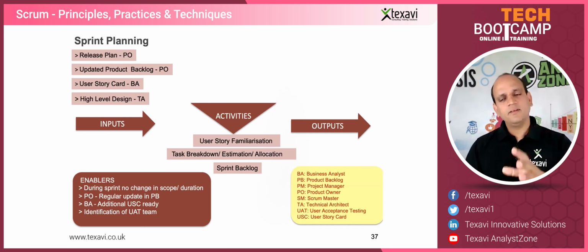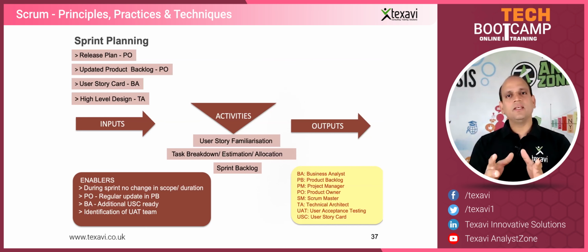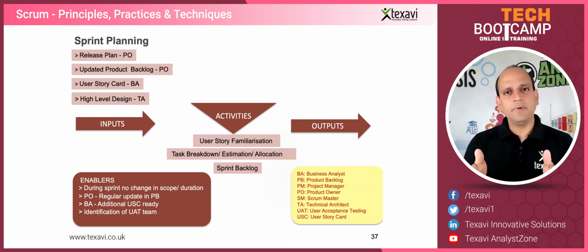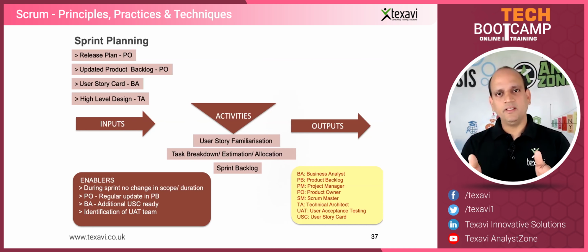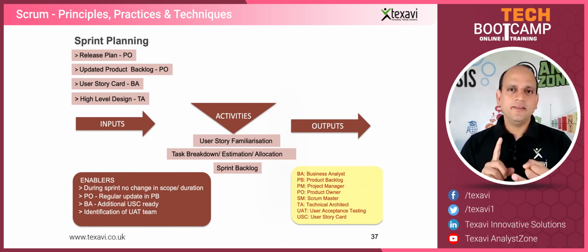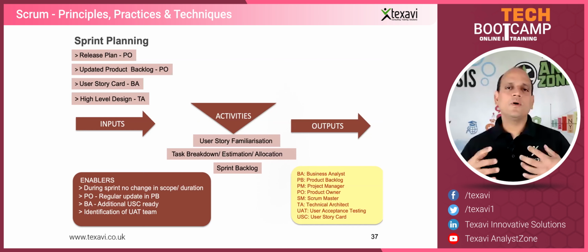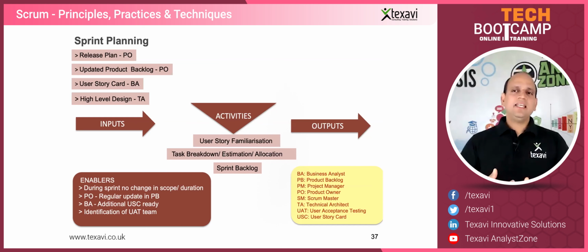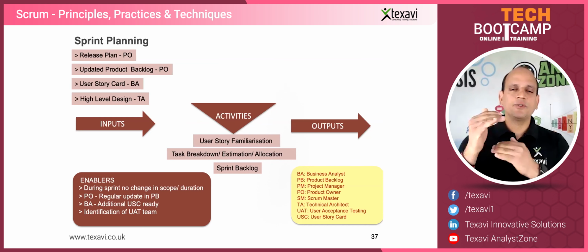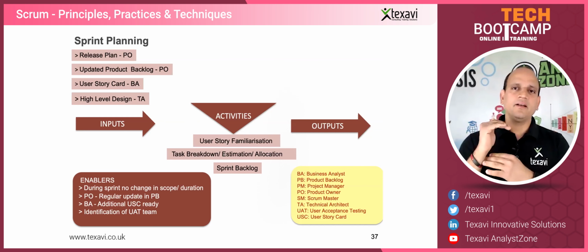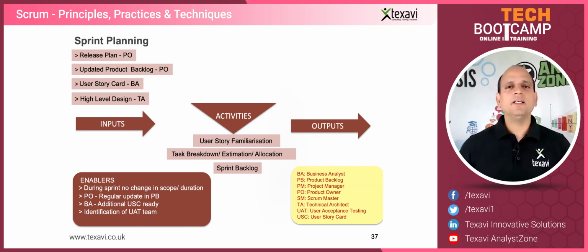And then you've already got some work done by the team. They can't just scrap all of that and start working on this and then still be able to deliver something by the end of the time box within the 2 weeks, right? Because they did not estimate, they did not scope, they did not commit the new thing or the changed thing. So what is important there is the team has committed to something, and that commitment is for the scope that you have identified, that you have estimated, and they said, okay, we're ready to go for these 7 items. And then you can't change the things that they've already committed.